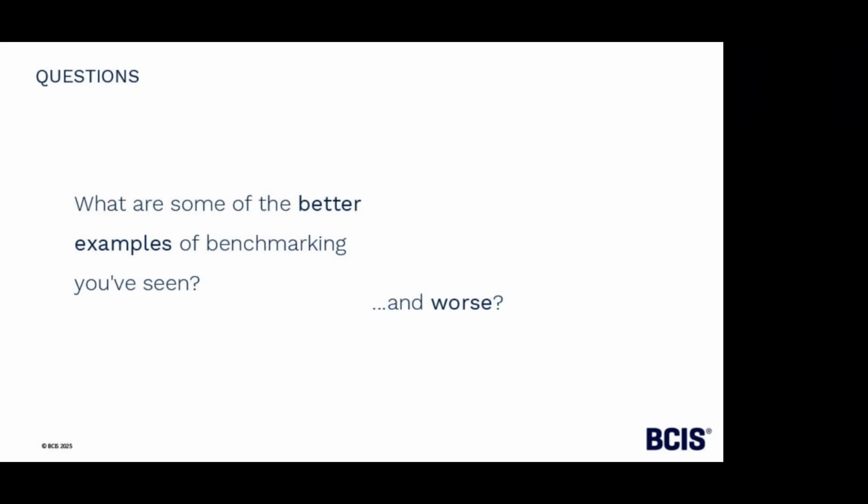So what we started to do was collect and analyse these cost drivers, and what impact they had on the number as well. What this did was allow us to move from what did their projects cost them to understanding what it should cost them in the future. By taking this information around cost drivers, when the estimates were being produced, we could say, actually, you're working in this particular area. You know from historical data that these things are likely to occur.